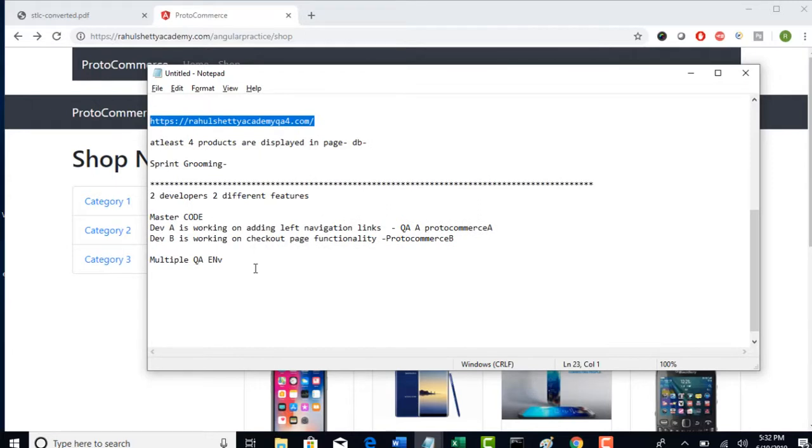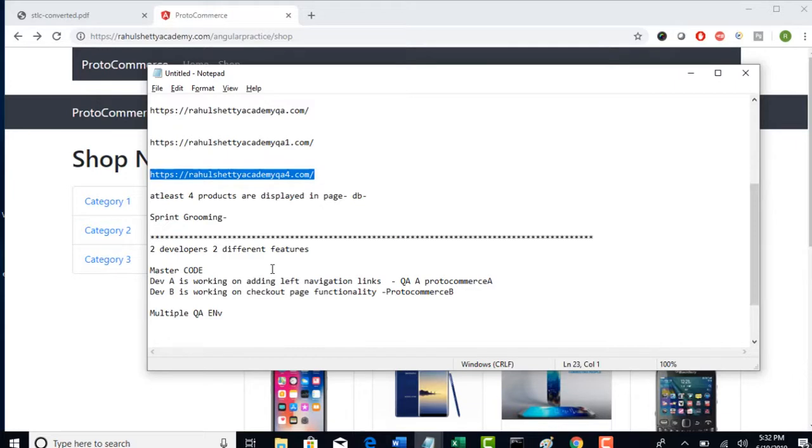So you can tell that the pain point is having too few environments, that you have only 1 or 2 environments in your project, but there are multiple teams working on it and everyone is trying to push their code onto the same environment, which is causing breakage and delaying us from giving sign off on the testing part, because you need to wait until someone completes their testing on the QA environment so that you can deploy your code there. That is really causing us a delay and you are not able to reach your commitments on time.